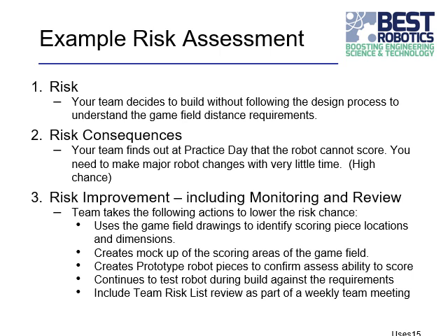your team can find out after you get your robot built that the robot can't score because you missed something. Maybe your robot is too big, maybe its arm isn't long enough, maybe, in particular from the game field, you don't understand how to interact with the pieces. You're going to have to face, with only 2 weeks left, needing to make major robot changes with very little time. And if you're ignoring the game field dimensions, that risk is pretty high.